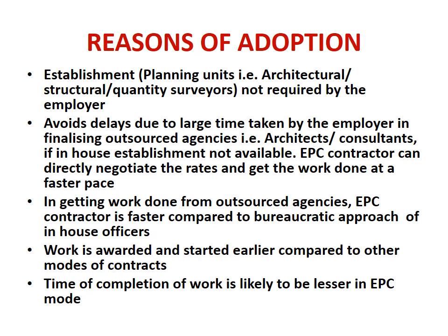In that case, when you call bids or contracts for engaging the architects and consultants, it takes time because it will be finalized through negotiated rates, press notice for a minimum period will be given, etc. Now the EPC contractor can directly negotiate the rates and get the work done at a faster pace. So this avoids delays and time is shortened.